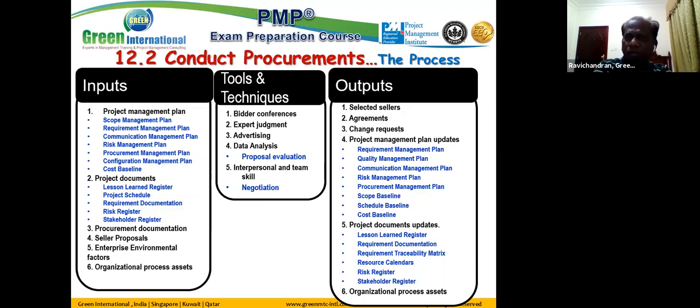Meaning you are proposing changes to the various plans based on the actual selection of the seller, which may require changes to the methodology, changes to technology, which end up modifying the quality management plan, communication management plan, risk management strategy, procurement management plan, scope baseline, schedule baseline, cost baseline. The lessons learned register can get updated, requirement documentation gets updated, requirement traceability matrix may get updated,